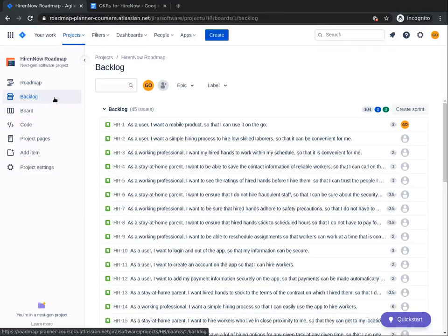A good example of an epic would be Launch Banking mobile app. This epic will include user stories aimed at designing the user interface, writing the source code, writing acceptance criteria and tests, and executing tests. In this task, you are going to create epics that will help the firm achieve its